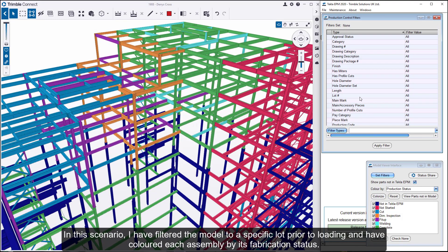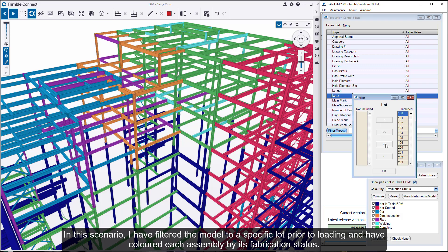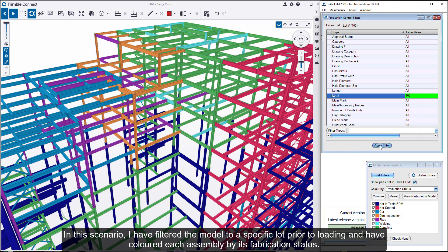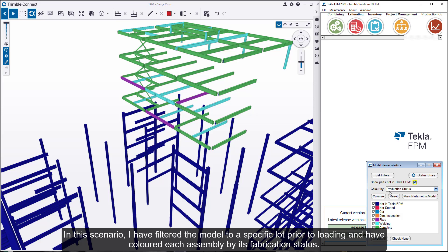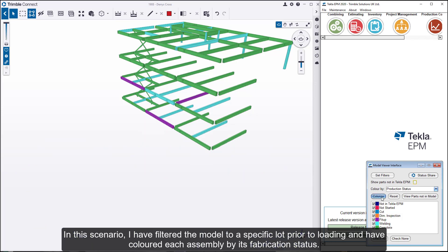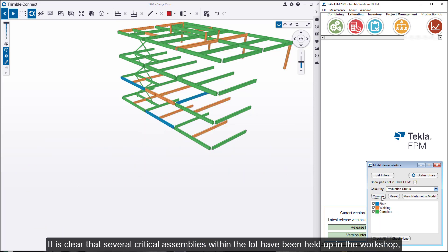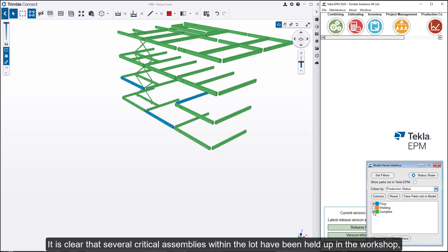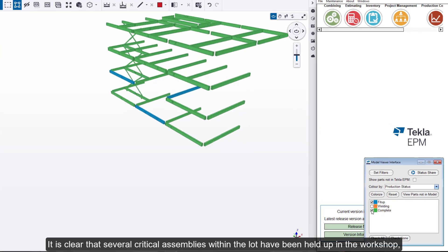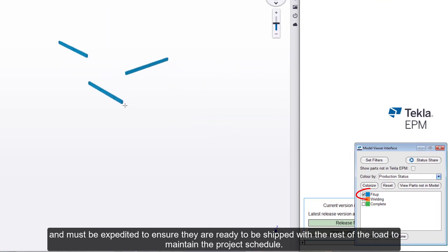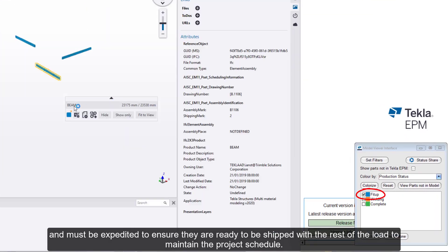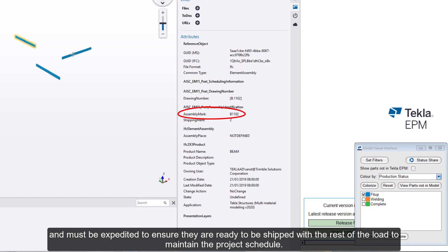In this scenario, I have filtered the model to a specific lot prior to loading and have colored each assembly by its fabrication status. It is clear that several critical assemblies within the lot have been held up in the workshop and must be expedited to ensure they are ready to be shipped with the rest of the load to maintain the project schedule.